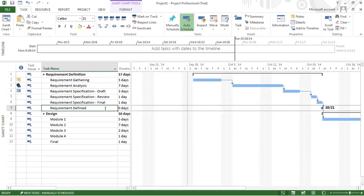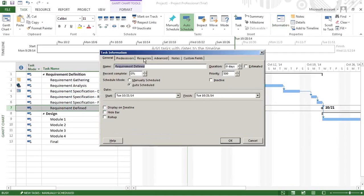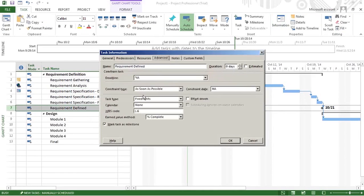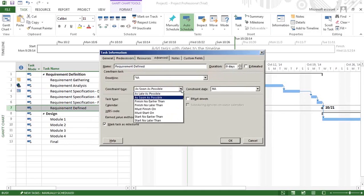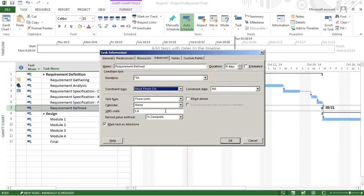This Requirements Defined task has a constraint. I go to the Advanced tab and instead of As Soon As Possible, Must Finish On is what I'll be looking for. In this case, the constraint date could be set.